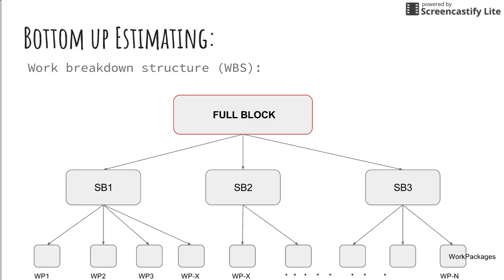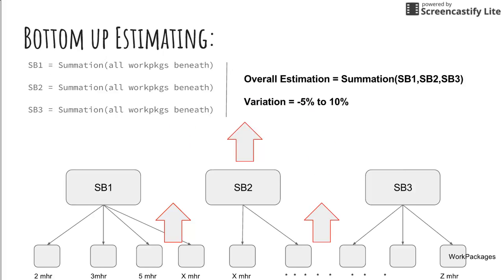The more granular levels, where it is easy to calculate effort, are called work packages, and summing them up would give you the overall estimation of your project.